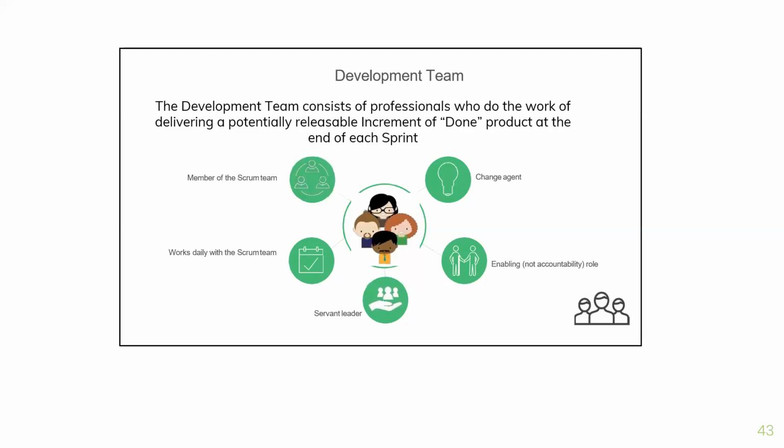It's the same thing for Agile development. If the team doesn't meet the definition of done, after the product manager has shared it, then it won't be released, right? They'll have to go back to the drawing board and then redo it again. Right, so that's the definition of done.